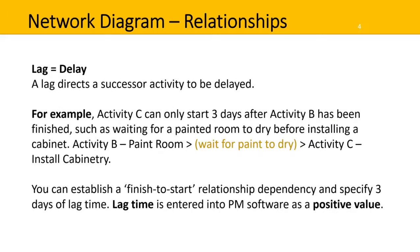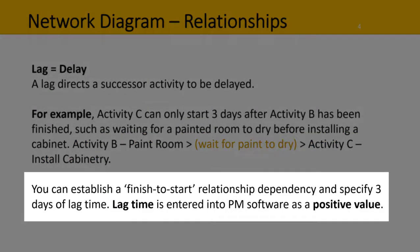A lag means a delay and directs a successor activity to be delayed. For example, activity C can only start three days after activity B has been finished, such as waiting for a painted room to dry before installing a cabinet. There's the relationship activity B paint room, then a lag waiting for the paint to dry, and then we can complete activity C install cabinetry. You can establish a finish-to-start relationship dependency and specify three days of lag time. Lag time is entered into project management software as a positive value.